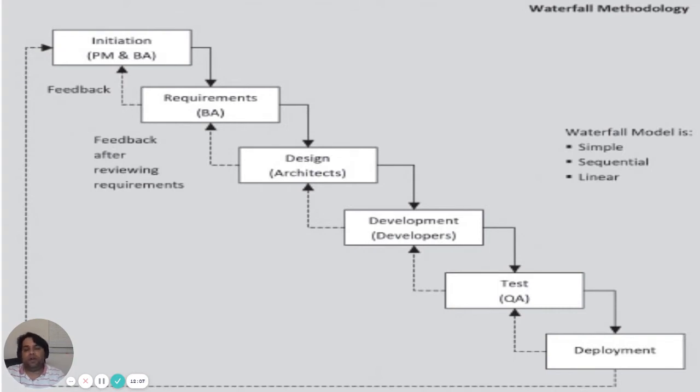Who is working on what, right? So you have to be very fluid in terms of your requirement and what you want to develop as a product. The linear structure of activity has some important consequences. In order to clearly identify the end of one phase and the beginning of the other, certification, formal sign-off, is needed at the end of each phase.